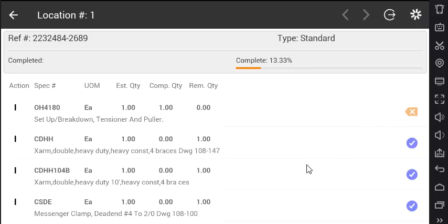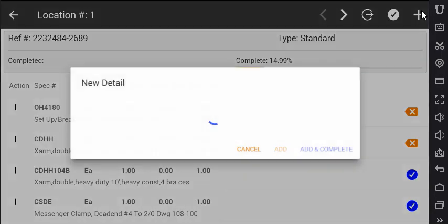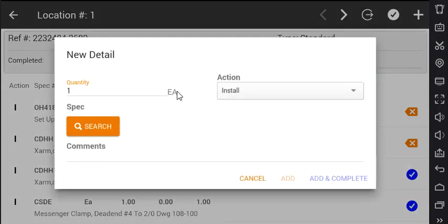There are tools available to help make this go faster. With Encore, one of the problems that I personally have is that so many of these CUs are not billable. If we go through this process, someone's got to go through and complete these. So we've got some utilities that we can turn on, that when the job starts, it automatically goes through and completes all the non-billable units and moves them out of the way of the foreman so he doesn't have to deal with this stuff.